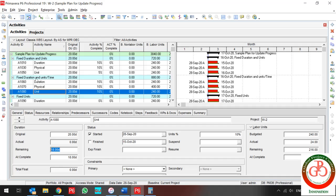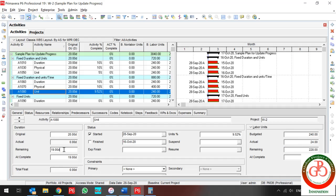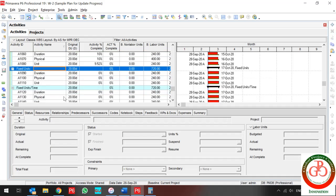With percent complete type Unit and duration type Fixed Duration and Unit Time, Unit type means work is fixed. If I change the remaining duration, because my duration and work are fixed, the actual is fixed, but the percent complete recalculates because my at-complete and remaining estimation totally changed based on the remaining duration. It may seem complex, but you set it up at the start of the project and then update it.